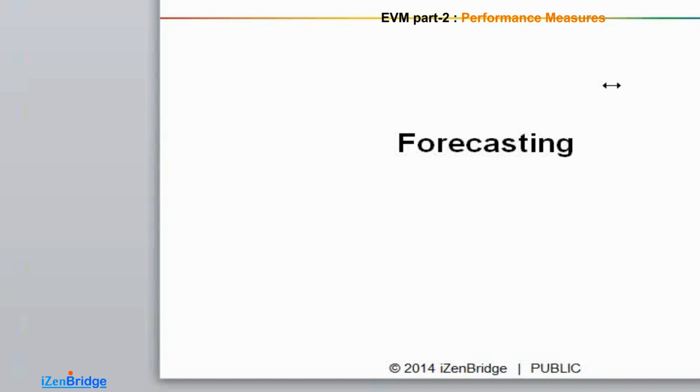I have a question: how often is EVM used in projects? As I said, until you have a compliance mandate, people don't use EVM. The second follow-up question could be how often do we calculate earned value and variances? Even if you are using EVM, unless you are using an automated tool, usually you do all these EVM calculations at a certain frequency. You don't do it every day.